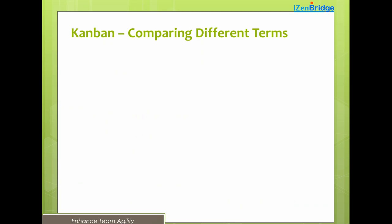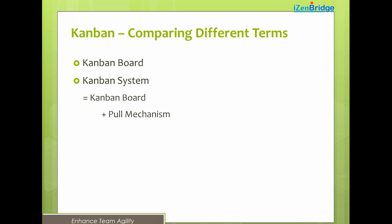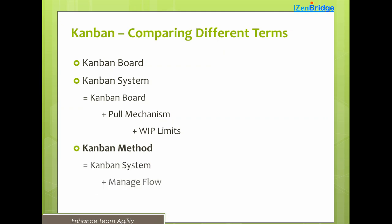Let's compare three commonly confused terms. First, the Kanban board — just the visualization of your work. Second, the Kanban system, a concept from the Toyota Production System in the late 1940s — roughly a Kanban board plus a pull mechanism where people pull work rather than having it pushed to them. Third, the Kanban method — more than the Kanban system — it includes managing flow with active use of Kanban metrics and implementing continuous improvement.